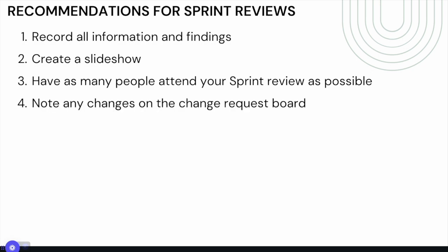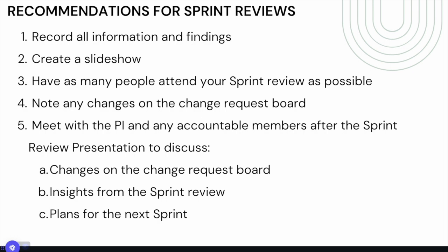4. Note any changes you'd like to make on the change request board based on the sprint review discussions. 5. Meet with the PI and any accountable lab members after the sprint review presentation to discuss changes on the change request board, insights from the sprint review, and finalize plans for the next sprint to ensure everyone is on the same page. This concludes the discussion of sprint reviews.